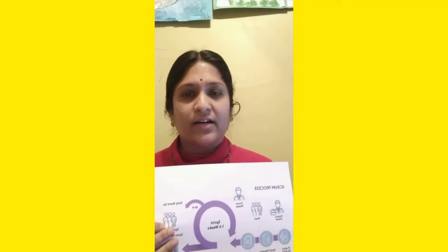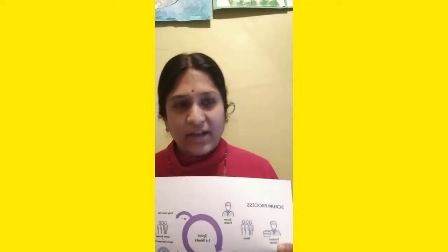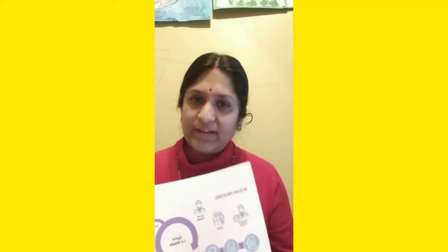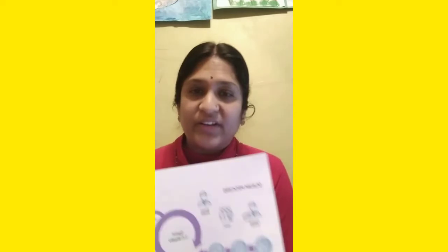And post sprint, we have two things, the sprint review and the sprint retrospective. So what is the sprint review? In this event, the product owner makes sure that the right stakeholders and the consumers are present, so that they can use this potentially shippable product and give their feedback. That is done in the sprint review. And the next one is the sprint retrospective. Here the team looks back on the process and the sprint, at what happened, how it went well, and what could be done better, so they can agree on doing something new and boost the productivity in the next sprint.